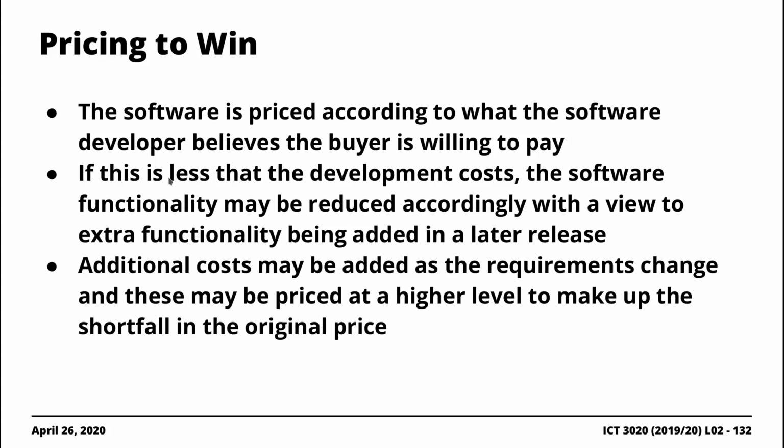If the software price is far less than the total development cost associated with the project, then the likely thing to do would be to make alterations to the software project so that you remove some of the features associated with the software. Removing the features would mean reducing the development costs, right? The goal should always be to either break even or to at least be able to make a markup on top of the total development cost of the software project.